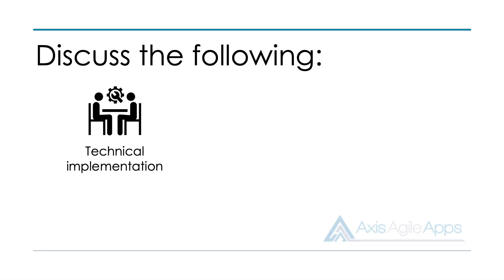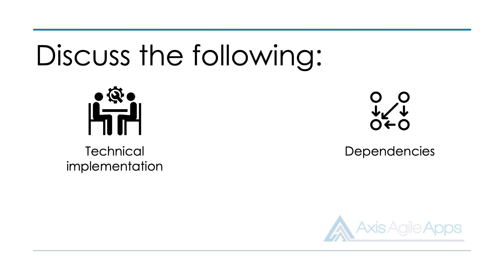There are a few points you'll want to discuss about each product backlog item. Number one: clarify the technical implementation — what's involved and who's doing what work. You'll be working with a cross-functional team in scrum, with people of different skill sets contributing in different ways, so make sure you capture that inside the user story. Secondly, consider dependencies. Your team may need to integrate with a third-party API, another system, or rely on a subject matter expert or person from another team to support the implementation.